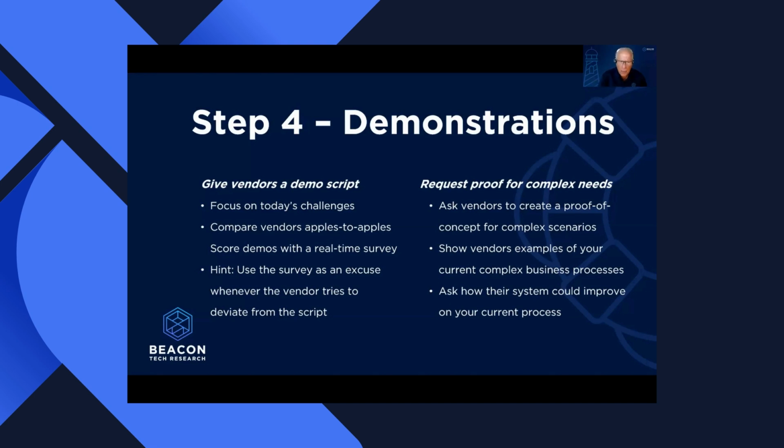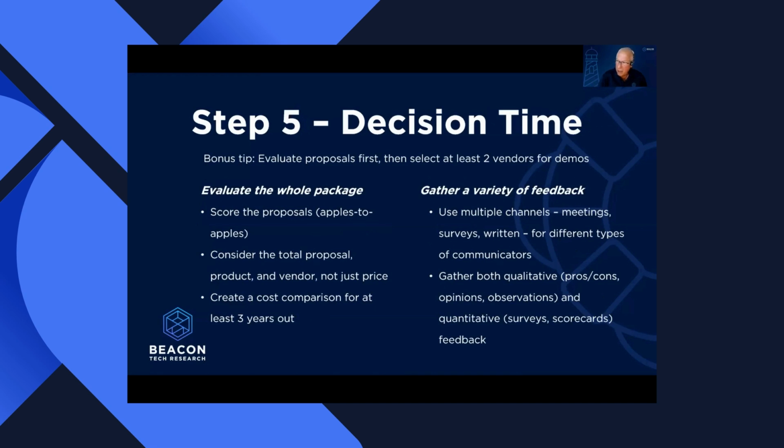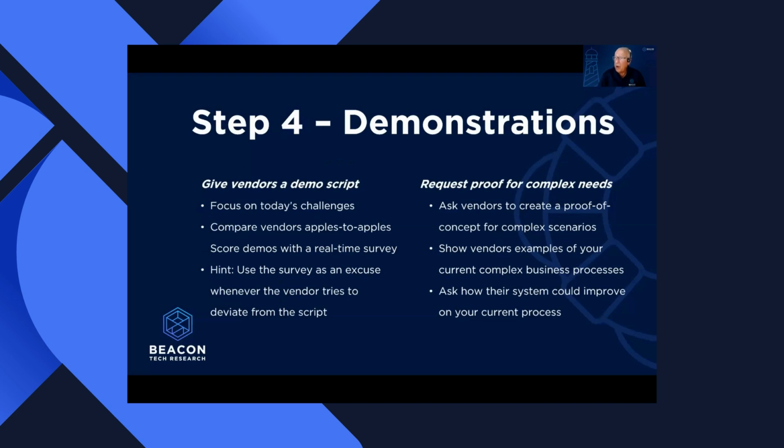Okay. And I recommend that you actually have 2 rounds of demos. The first round is for everybody that on the surface is capable of meeting the requirements that you spelled out, based on the proposals that they've provided, or the responses to the RFQ or RFI. And that should be everybody, 4 or 5 vendors. More than that kind of gets shaky. And remember, you're going to be doing these team surveys in real time while the demo is happening. So you'll be able to score those afterwards, and you will all know by the end of the first round of demos who your top 2 are.